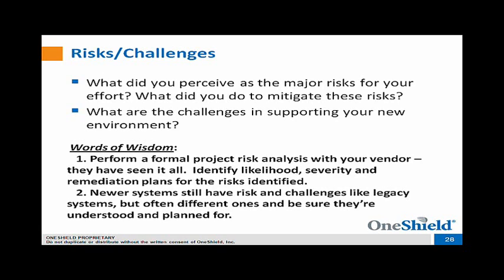I mean, the main risks really, among all the traditional risk management of a project, this one is the size. The sheer size of the project, because the first implementation is always the biggest. We try not to do projects that span more than a year and a half. When you're approaching that, that's where you risk a lot of different things coming up: different priorities coming, people changing roles, people losing sight. So the challenge we had is how do you deliver enough usable functionality, and like we talked about, include conversion and integration, in a project that is about 16 months to production.